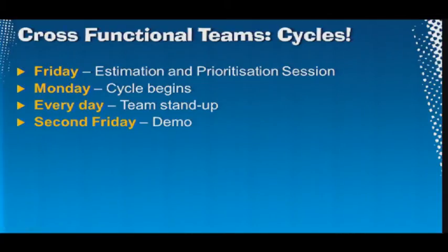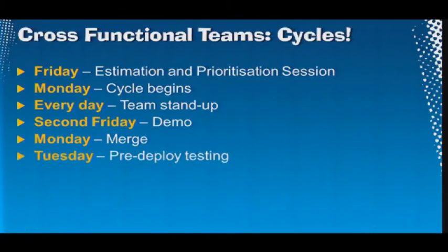On the second Friday of the 3-week cycle, we go into a demo. The demo is good because of all the reasons we said before. Hopefully nothing's come out of that demo that means we need to change stuff. On the Monday, we have our merge, but we can also do some coding changes on that Monday as well if we need to. So the Monday merge might be in the morning, might be in the afternoon, sometimes it might even be on Tuesday morning. All going well, we'll go into that pre-deploy testing I talked about. So we're TDDing all the way through, we're doing testing as we go. But in the end, when we integrate stuff, we've done our merge, we're back in trunk, we need to test that, make sure it's not going to break the site.